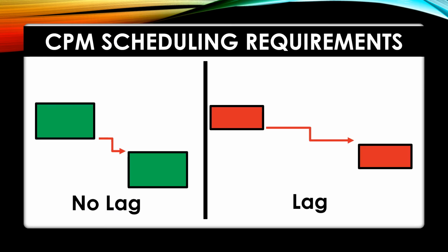Moving on, this brings me to my third point on lags. Lags between relationships. Honestly, we never really want to use a lag between a relationship. A lag is just an absence of time between activities. There are times in our project we'll have to use lags because basically during that time there was no work being done, but we don't really want to use them. When this happens, that absence of time really needs to be justified.